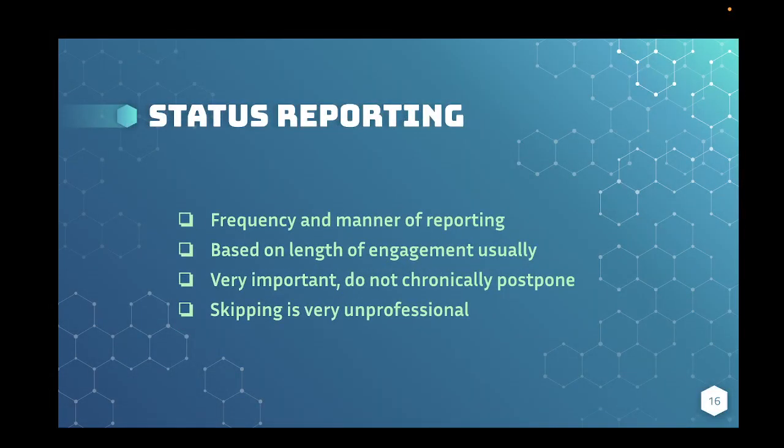For the status reports, it should be noted that there's a frequency of reporting, and it should be agreed upon between the client and the pen tester. This frequency and manner of reporting should be defined beforehand as well, and it's usually based on the length of the engagement, because there's no use in holding a weekly status meeting if your engagement only lasts 2 weeks, unless you only want to have one, of course.